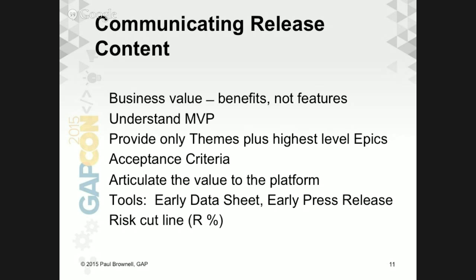The other important thing to note is most software projects don't accomplish 100% of their original plan. So if someone defines a project so that unless you accomplish 100% of it on the original schedule and on the original budget, that is a very high risk project. You're risking the content or the schedule or the budget or all 3.